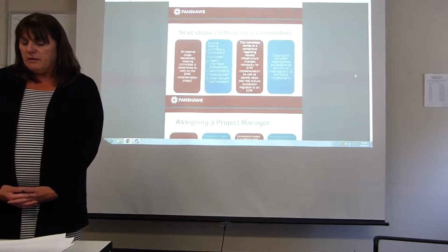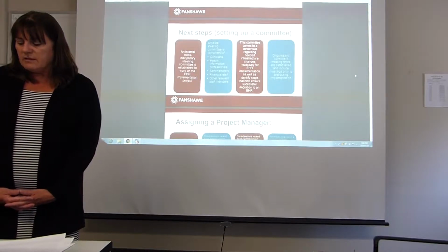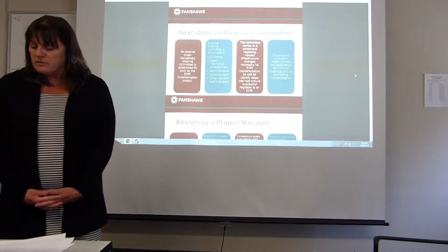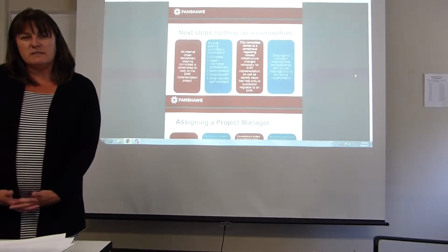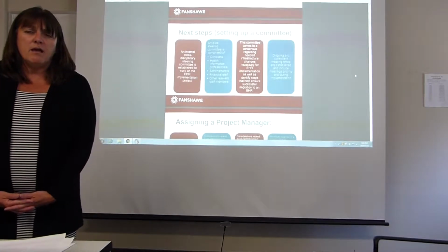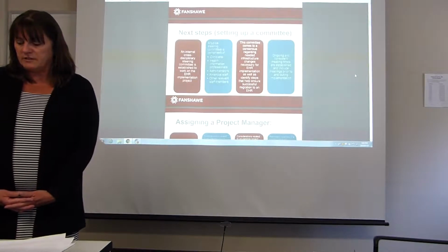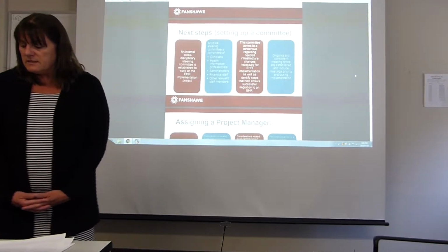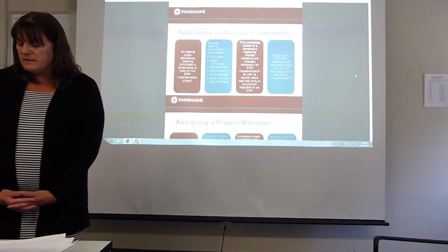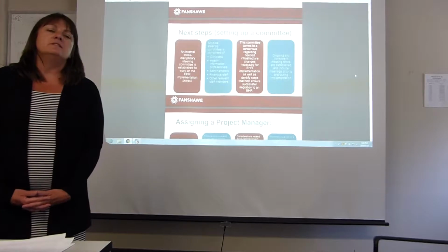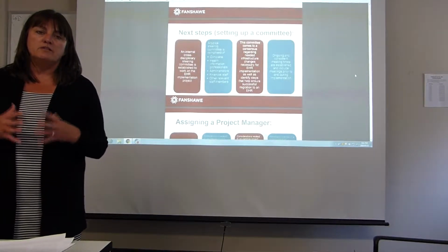A typical steering committee, though, who reports to this project sponsor, would be comprised of clinicians, health information professionals, administrative, financial staff, and other relevant staff members such as pharmacists, maybe physiotherapy, occupational therapy, or maybe a representative of some of those allied health professionals. This committee comes to consensus on the infrastructure changes that are needed to implement, as well as to identify the steps for the successful migration of the electronic health record. And they usually do that through a project charter.